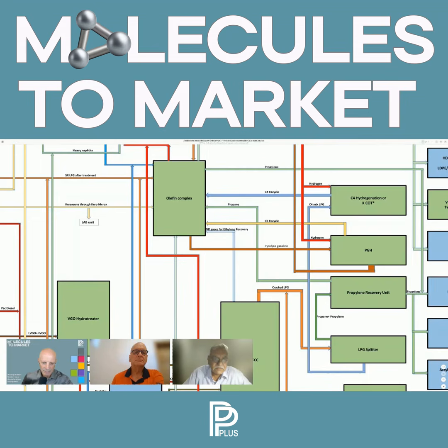But let's say Saudi Aramco comes and says $10 billion, now it is in the decision-making process. For that to happen, the first thing is that a JV company will be formed. I have to make a subsidiary company. So company formation will take place between IOCL and Saudi Aramco. It will be given a name. It will have a board, a structure, a corporate setup, a management. And that company will be entrusted with the task of implementing this project.